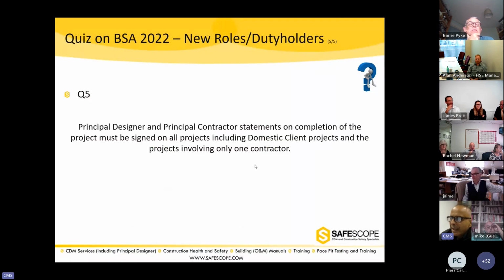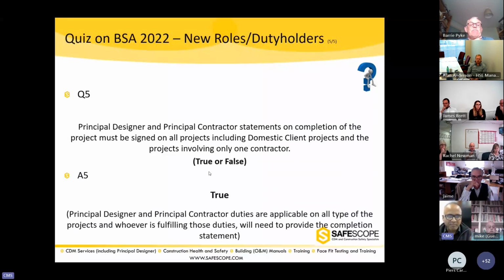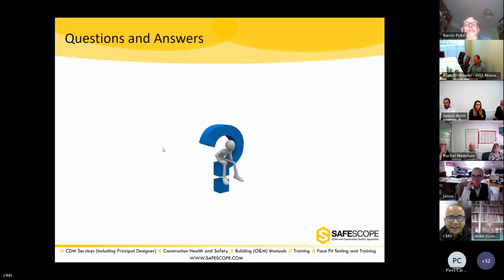The last one: principal designer and principal contractor statements on completion of the project must be signed on all projects, including domestic client projects and projects involving only one contractor. True or false? True. To be signed on all projects.